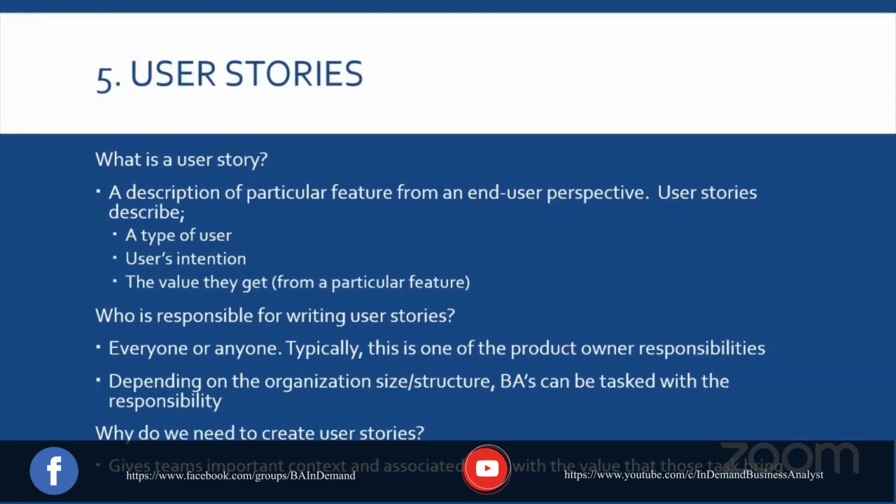So what you just said, reverse it. The use cases drill down into very specific details of what a person does. The way the agile methodology teaches us to write a user story is to think of an index card. On the front of the index card, it's a few lines of description of what the user can perform with a function or a feature, and what their end goal is.